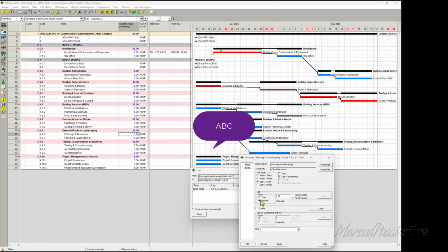So I will make a lag of 2.5 days. But if I start to work and do nothing, I have to re-lag another 3 days, because you will be forced to calculate percents according to time.